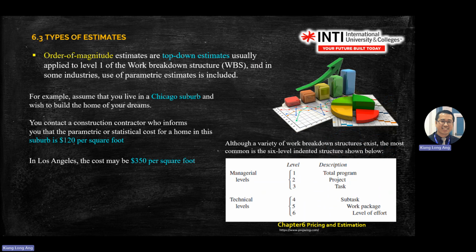When you sit at the top, you won't see very, very detailed things. Okay. You as a CEO, you as an MD, normally you have an overview and you don't go deep into that plus minus things. So when you have an order of magnitude estimate, you normally go from the top down, meaning from the top here. So here your accuracy will be plus minus 35%. But when you come to technical guys, like you are, engineering guys, you are very particular in how you screw the screw inside the hole. It must be plus minus how many.